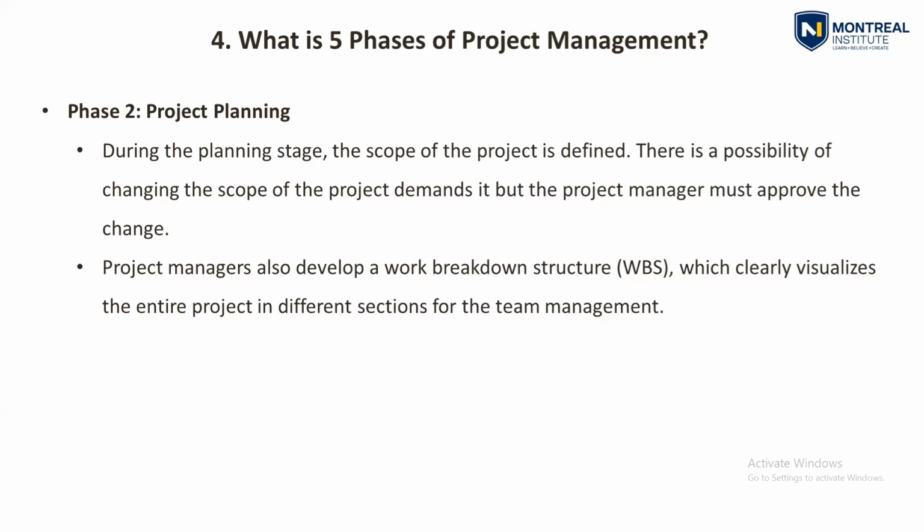For example, for a common project like a building project, you will define the breakdown structure like this. You will have preliminaries as a first WBS, engineering as a second WBS, procurement as your third WBS, and construction as your fourth WBS. The fifth one will be your testing and commissioning WBS.